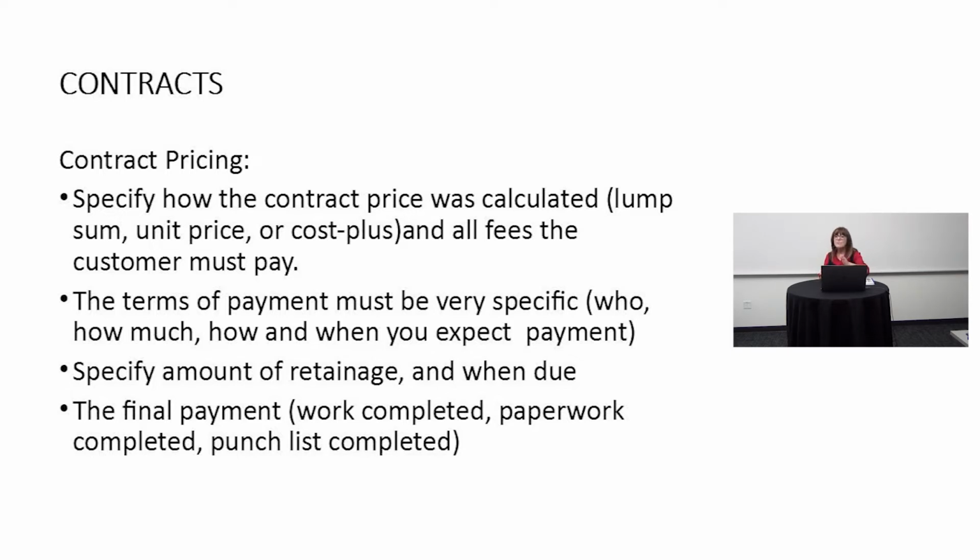The terms of payment must be very specific. Who's going to pay? How much are they going to pay? How and when you expect to get your payment. Specify the amount of retainage and when due.